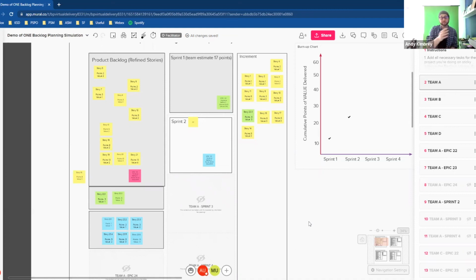But after the first sprint, sometimes I'll say, how do you feel about the time box? Is 10 minutes enough time? Or do you want more time? Or do you need less time? And it's okay to alter the time box, provided that the whole team agrees. So if everyone says yes, we definitely need 15 minutes for this, and everyone votes yes, then you can say, okay, we'll go up to 15 minutes and we'll keep the time box at 15 minutes going forward.